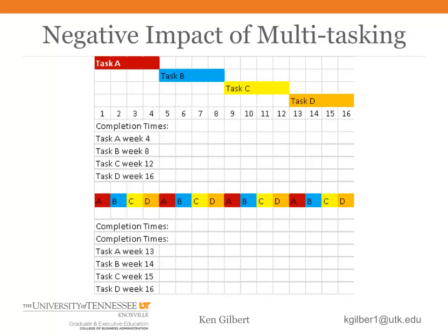But the most important thing is not shown in this drawing. That is the time that you waste switching between tasks. Let me repeat that. Changing between tasks will cost time. And in addition, it will cause more mistakes and more defects.